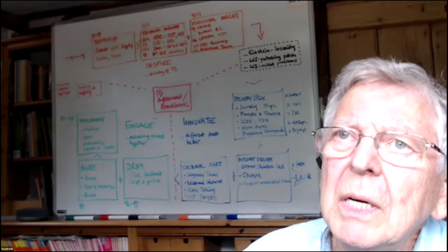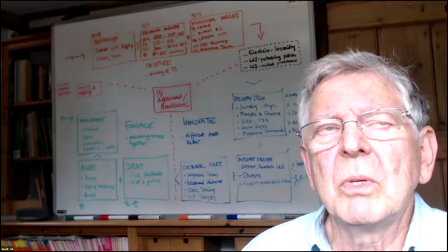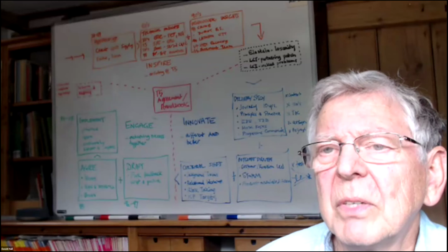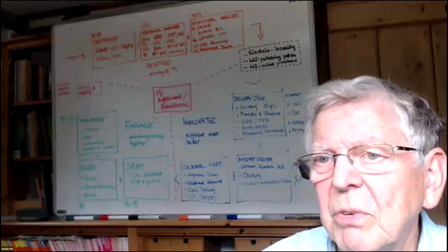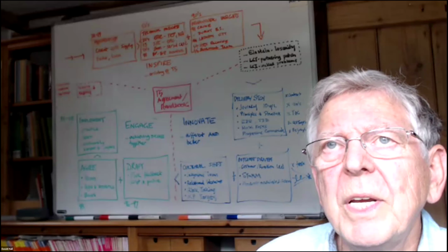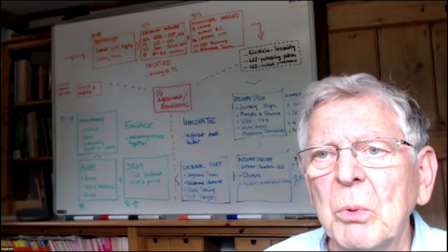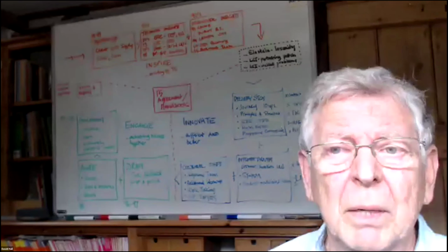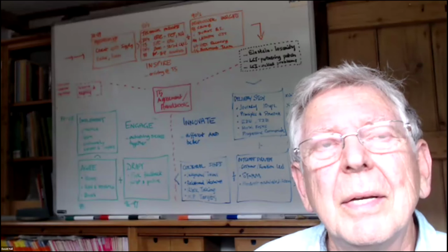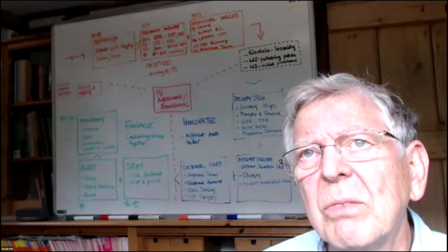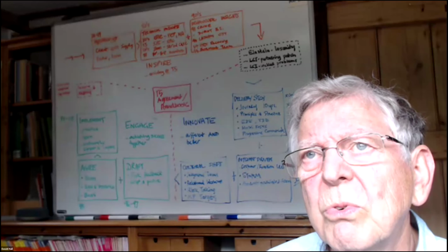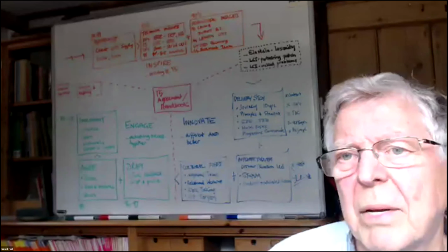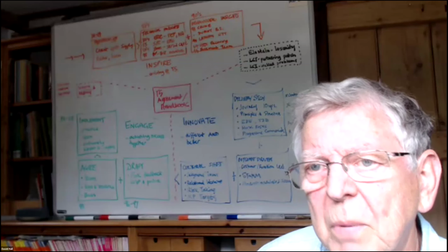And then in the 80s, again, in my time with ESSO, we did 50% work in the North Sea with Shell. A tax break meant that if we could deliver a gas field a year earlier, there was a significant business income opportunity. So we decided that we would just try something different and see how it works. We created a contracting strategy, which I now think is used worldwide in quite a lot of situations, which we called EPIC: engineer, procure, install and commission. At the very start of the project we created an integrated team, all driven by a common objective in delivering a business outcome. It's less about building a platform and more about achieving a business outcome. And that's stuck in my mind for many a year.